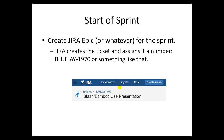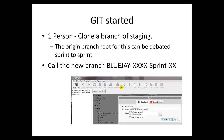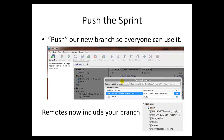Let's go over what our standard sprint process would look like. The Scrum Master would create a JIRA epic or ticket for that sprint. JIRA then creates the ticket and assigns it a number, like BlueJ 1970 or something like that. One person — again probably the Scrum Master — is going to clone a branch of staging. We're going to call that new branch BlueJ, whatever the ticket number is, and whatever the sprint number is. Here you can see BlueJ 1970 — that's the JIRA ticket number. Once I've created this local branch, I then push it out and everyone can use it together.